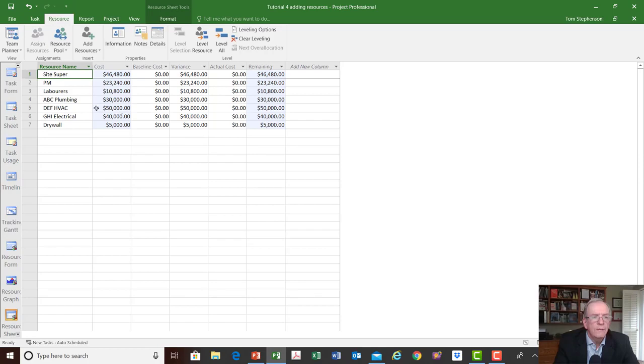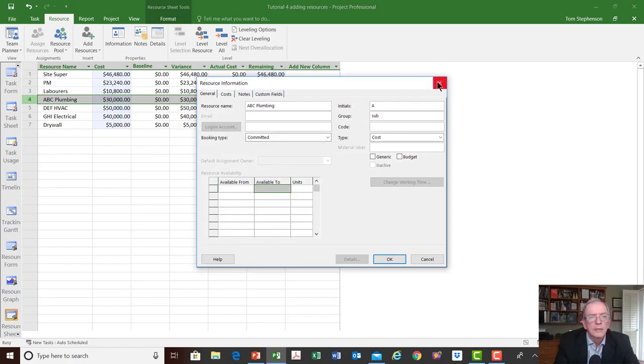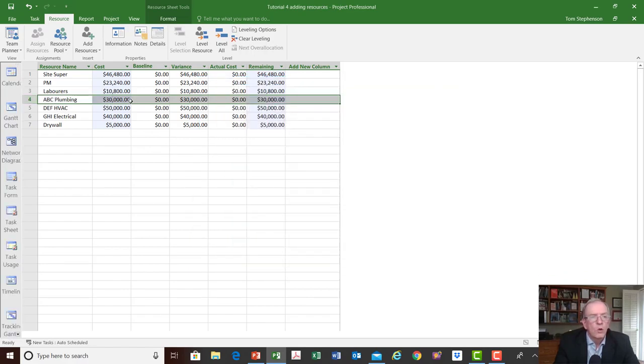Remember the DEF HVAC? That's $50,000. We had two payments, right? One was $30,000, I believe, and one was $20,000. I think ABC Plumbing we had $15,000 and $15,000, and I think GHI we had $20,000 and $20,000. What you'd want to do is make sure here that this amount is totaling what your contract is with them. So you might have 6 or 7 payments, but the 6 or 7 payments should total what your contract is.